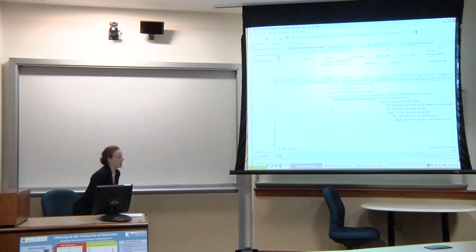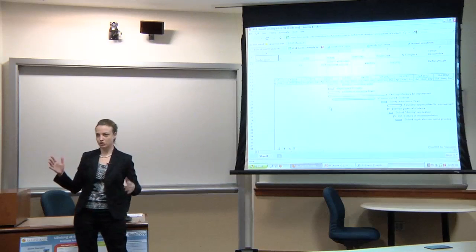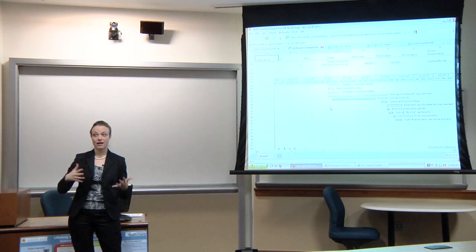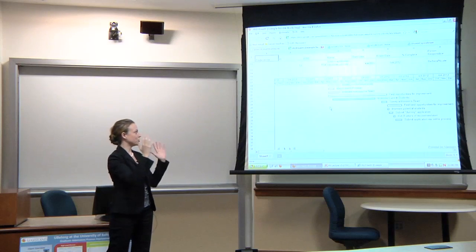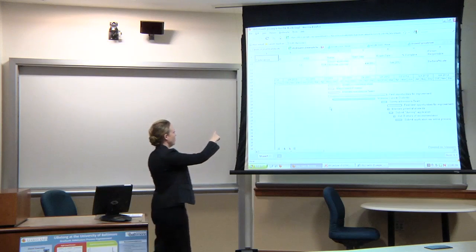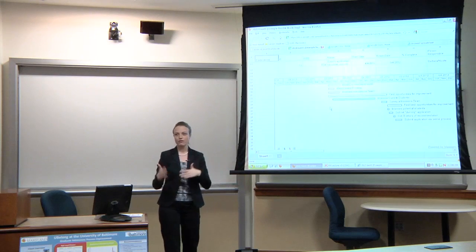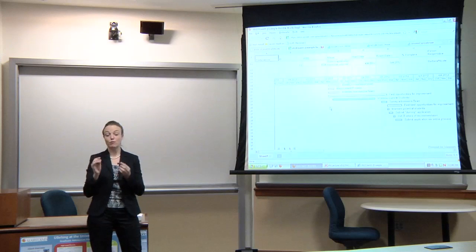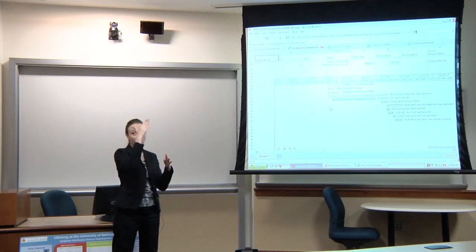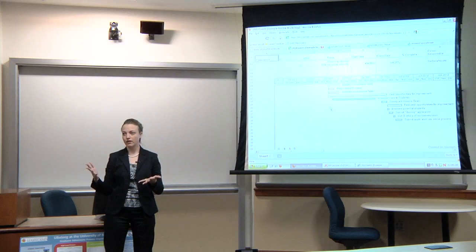The benefit to this is that we're talking about the task structure, how much time do things take? If I have to add an extra week to this particular task, how is it going to impact everything else? This gives you sort of a visual thing. You're like, well, task 1 or task 2 is the huge part of this whole project. If task 1 goes on longer, then we're going to run out of time to complete task 2. So it helps keep everybody on track, and then okay, maybe we have to edit this, maybe we have to cut this little task out because it's not so important. But it gives you an idea of how one thing impacts everything else. And that, I think, is the real help that a Gantt chart offers.